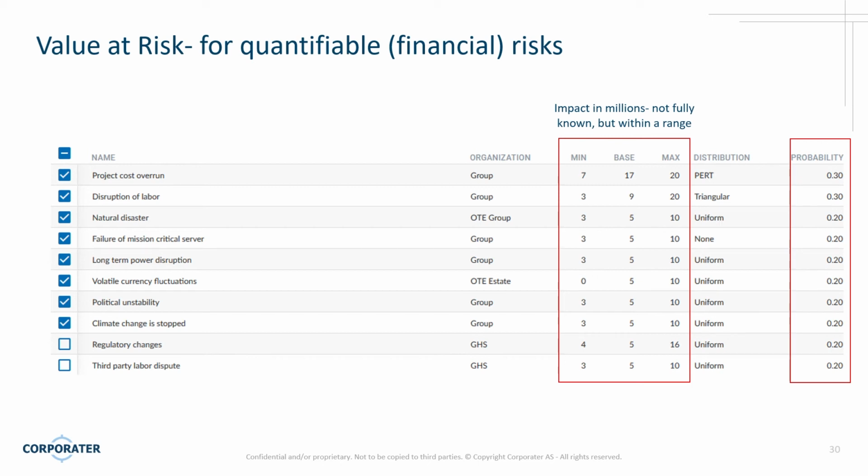If we were making a Monte Carlo simulation to work with a portfolio of investments, for instance, we would not use probability at all because we know the investments will have some sort of price. But in the risk world, things are a bit different. We don't really know if the risk event will occur. And so that's why we use the probability. And that also is used to show the different combinations in which the risk events occurred, like the different combinations of when you roll dice, for instance, like we saw earlier.